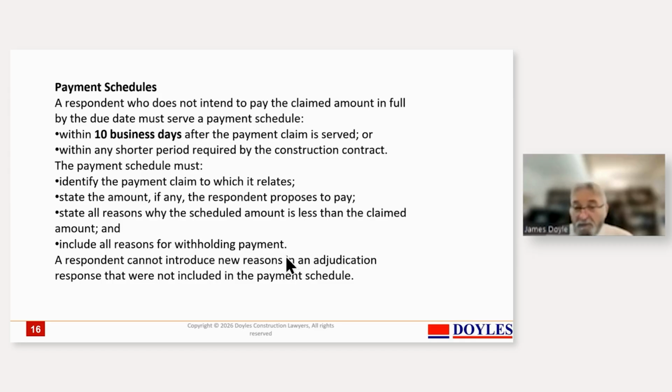and you've got to get the reasons out within the recognised time. And in that, it is again a situation where the time limits are crucial. If you get a payment schedule back 2 days late, it's worth nothing. So if it's 2 days early, it's fine. 2 days late, it's nothing. You've got to realise that the time is an essential, mandatory element of the whole process.